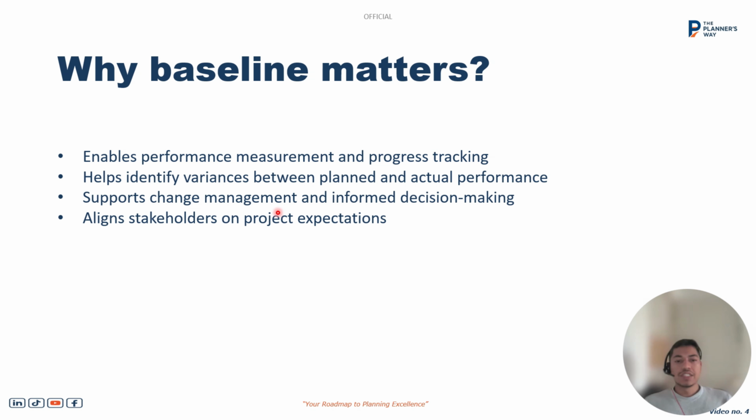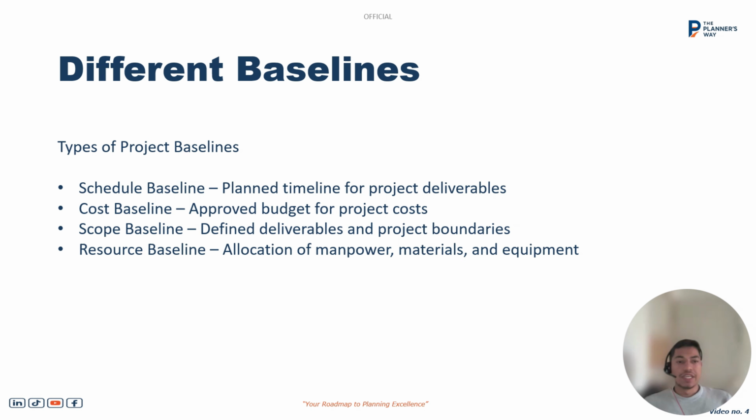It supports change management and decision making as well. If there is any change that needs to be implemented on the project, we can introduce it on the baseline and see the impact, how much the baseline or the schedule is impacted, and whether to undertake the change or not. It will make for efficient decision making for the higher stakeholders. And once the baseline is set, it is agreed by all the parties what we need to do, so everyone's project expectations are fulfilled after maintaining the baseline.